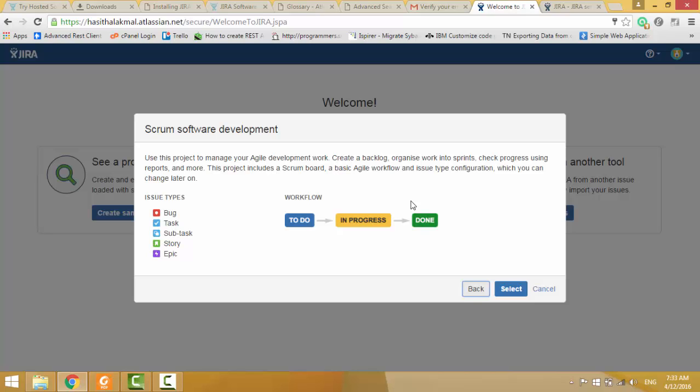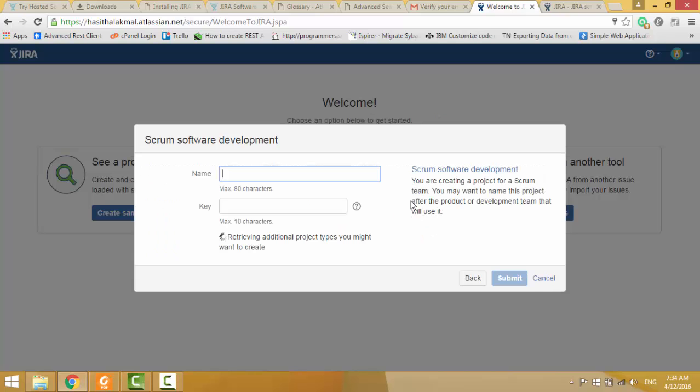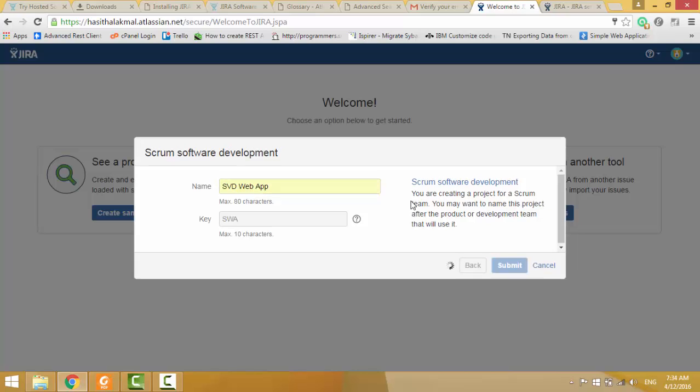Epics is a bigger task. Story is a user story. Task means, to achieve that user story, we can do some development task. If task is too much large, we can use subtasks to work breakdown in process. If those tasks or subtasks have some issues, it means bugs, we can select bug as an issue type. Then, I select those things. Then, name, I will give SVD Webapp, SWA. It takes first characters, then submit.